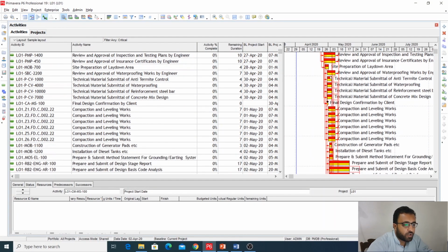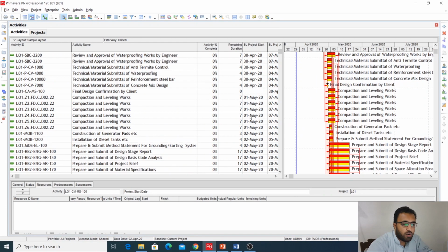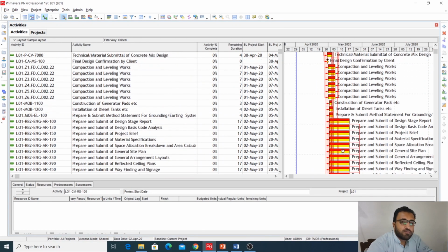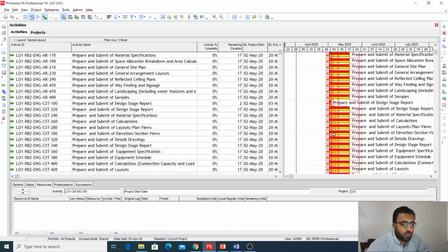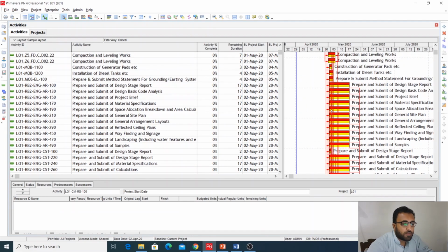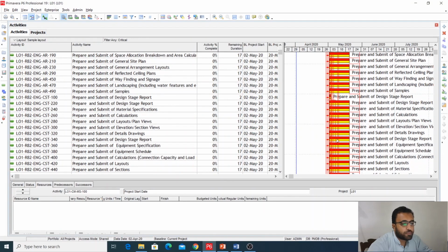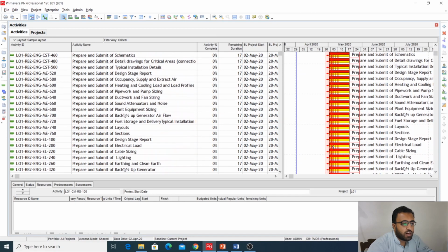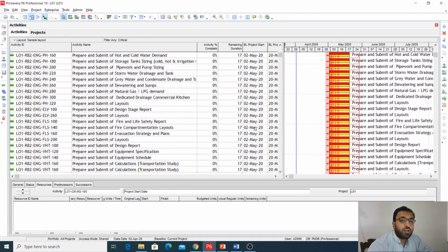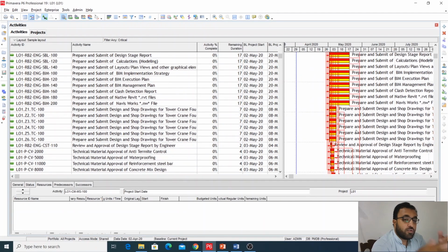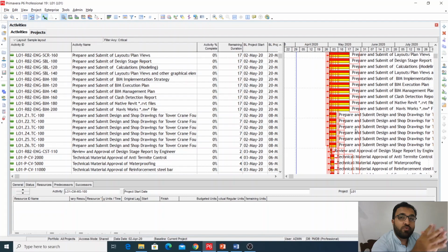Okay, 30th April, then 1st May, then 2nd May. You see here all these activities are starting at the same day. How many? 1, 2, 3 ... up to 20. Oh my god, I don't know how many. All 2nd May, 2nd May, 2nd May. This is wrong. When too many activities are starting in parallel, it means you have too many multiple critical paths. So this is more risk to your project.